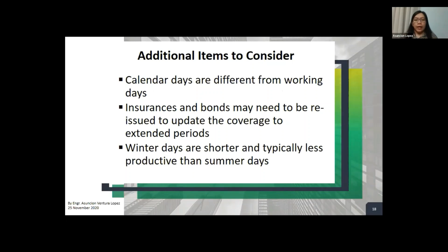What other additional items do you have to consider? As I mentioned earlier, calendar days are different from working days, so you have to take note of that. The insurances and the bonds may need to be reissued. If there will be an extension of time, definitely the insurance and bonds validity will be affected, so you have to note that they must be reissued and the validity period updated.